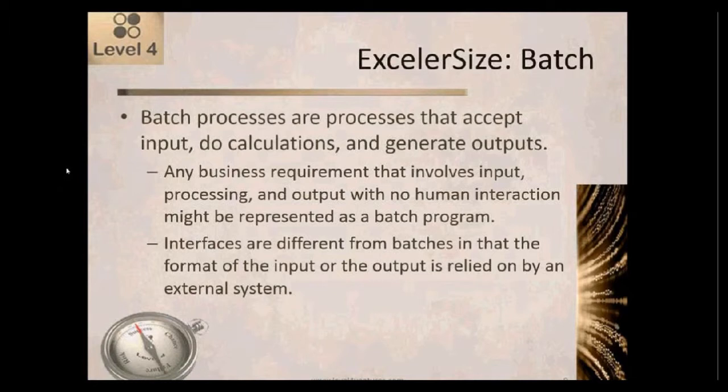Interfaces are different from batches. They're similar, but interfaces are different from batches in that the format of the input or of the output is relied on by an external system or an external group. So with a normal batch, the people who are designing the batch have pretty much control over how they format the inputs and outputs to meet their needs, whereas with an interface, you may not have that control.